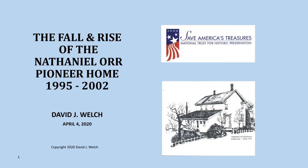I retired in 1995 and was looking for something to do. I volunteered to help Joan. A work package was put together in 1995. Bids were solicited and the work was begun in early 1996. On May 13, 1996, the home fell from temporary supports and was severely damaged. This is the story of the recovery from that event, the fall and rise of the Orr home.